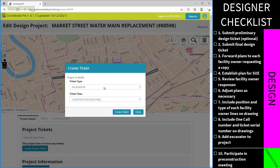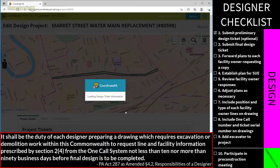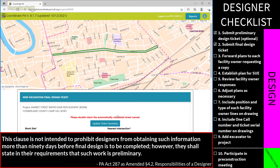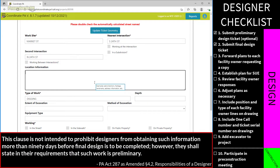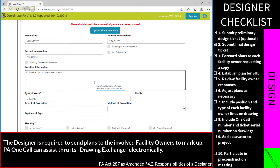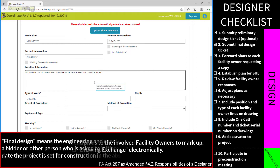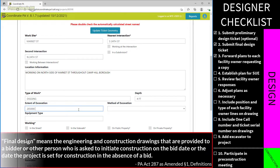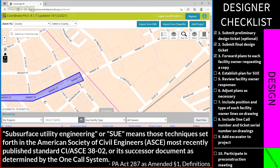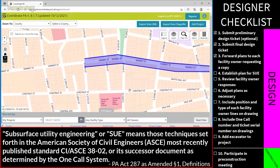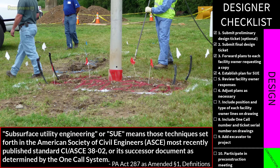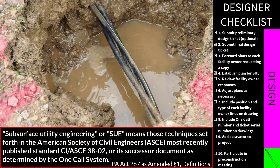The designer's first job is to submit a design ticket. There are two types depending on timing. If the design request is more than 90 business days out, a preliminary design ticket is submitted — this step is optional. The final design ticket, submitted 90 to 10 business days before the final design is to be completed, is required by law to request line and facility information. Plans are sent to involved facility owners, allowing them to show where their lines intersect with the design. This can be done electronically through CPA, with facility owners responding through CARL.